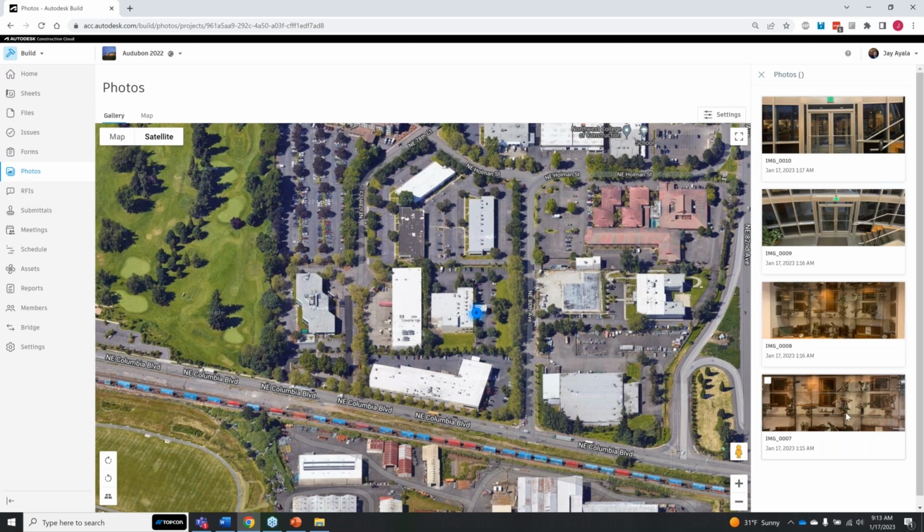Once they put the gypsum wall boards on, you don't know unless you have some kind of augmented reality. But he took photographs of where all the stud layout was, and it was really helpful to him later. So I love the concept of being able to take progress photos as it's going along.